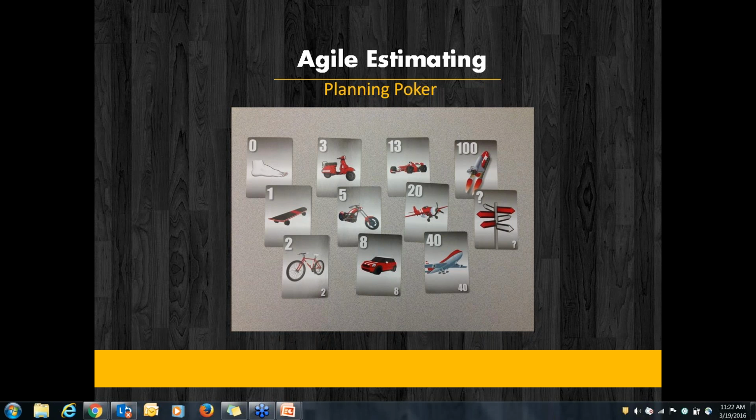So initially it is a tricky part, but if you say they are good at relative estimation and not good at absolute, then something is missing out there, because the team collectively comes up with how much effort is needed. They don't have to be forced by the management, because if you see here, it was actually 100 hours of work, but the team had estimated 240 hours of work, for example. So maybe they might have been pressurized by the management, or maybe there were some impediments or roadblocks which came up, which can be taken care of. But while estimating, we already consider that in the buffer item.